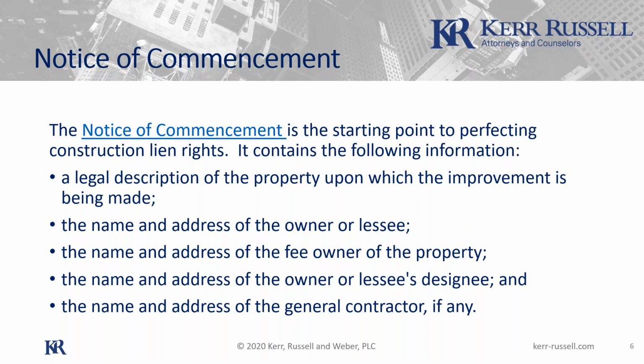The only one that you can't kind of get by with, oh shucks, I tried, is the 90-day period for the filing of the claim of lien. That one is a real red light. If you screw that up, you're done. There's no getting around that.